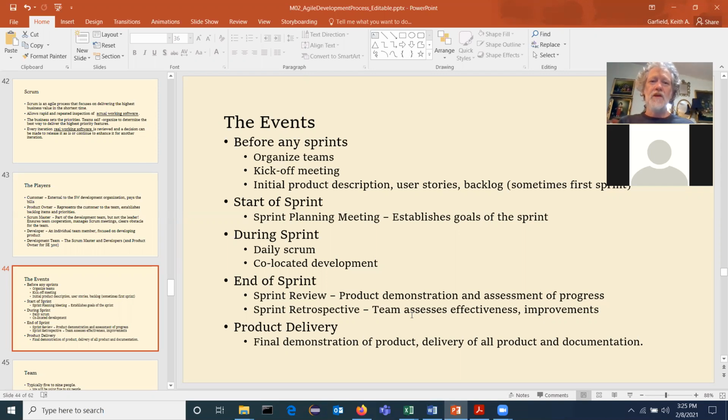For example, I said, if you're going to take on a task and a user story for a particular sprint, at the end of the sprint, that user story is done. That means that working code was developed and tested. So as part of the sprint, you're not just going to write the code, you're going to write your test cases and then do the tests, and all I'm asking you to do is fill that out in a spreadsheet that I provide to you at the time you did the test.